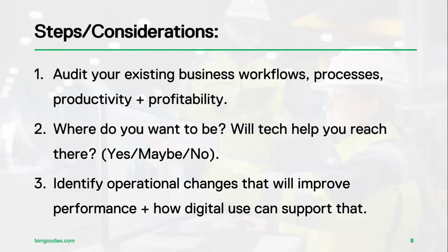I'll give an example of quantity surveying, for example. If you are doing manual takeoff, together with maybe taking off from on-screen PDFs, you might, for example, want to change from using spreadsheets and PDFs to maybe using BIM models, where you are able to extract information that has been put there by the designers, or part of the information that you may also contribute to the model, to extract building quantities and be able to prepare maybe cost estimates from that.